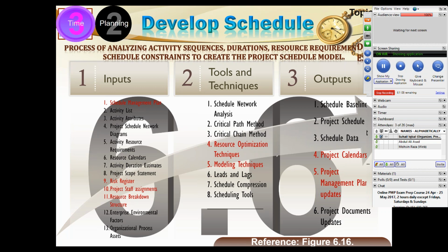Yes, sir, but we can ask those activities to contribute as well in the buffer, or no? They do not impact the project buffer. They have to contribute, of course, but not for the project buffer, but for their own personal protection. Every path must build their own personal protection, and that is called a feeding buffer. At the end of every path, there has to be built a personal protection of that path, which is called the feeding buffer.